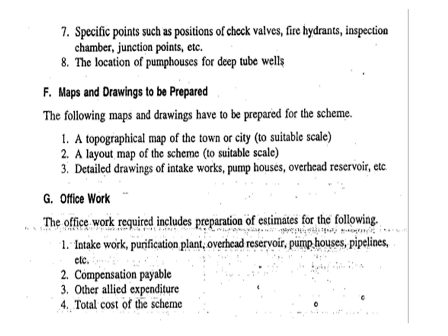The following maps and drawings have to be prepared for the scheme: a topographic map of the town or city to a suitable scale; the layout map of the scheme; and detailed drawings of intake work, pump houses, overhead reservoirs, etc. The office work required includes preparation of estimates for: intake work; purification plant; overhead reservoirs; pump houses; pipelines; compensation payable; other allied expenditures; and the total cost of the scheme.